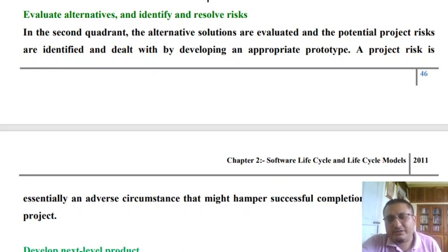If a risk is a very low priority risk, then you can ignore or avoid that particular risk. If a risk has a very nominal influence, then we can accept that particular risk. If a risk has a very high priority or a very high damage causing potential, then we need to reduce the influence of the risk. Reduction can be done by oneself, or the risk can be transferred to some other person for managing it. So these are the various risk management steps that are involved in managing risk.